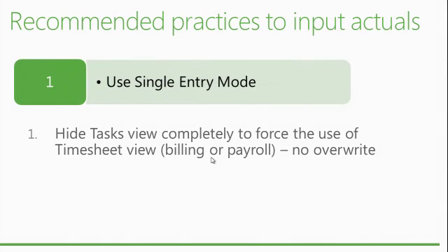So the use single entry mode basically forces you to enter your time, your actuals, in the timesheet view. A recommended practice, if you do that, is to hide the task view. So why do you want to do that? It's to avoid errors, for example.